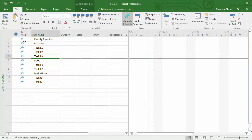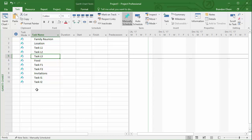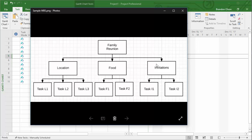With those in place, I'm going to create this hierarchy using the indentation option in Microsoft Project. We begin by entering all the tasks as I did already, and then we're going to indent each of these to match this hierarchy that we have established in this visual model. Family reunion is the top, below that is location, food, and invitations. Below or within location are the individual location tasks, the food tasks, and the invitation tasks.